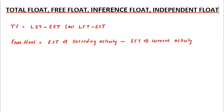Next is interference float. That means the portion of the total float which affects the succeeding activity but does not affect the project completion. The formula for interference float is: Total Float minus Free Float.